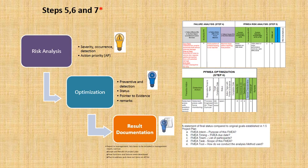And you need to prepare a report to management, and you need to reflect back on the scope and results of the project plan. You need to talk about how the functions in the fields were developed, and you need to plan to address and close out any items that may be still left on the action priority list. One of the other things that you want to do is collate all the high risk levels. You really want to make the report impactful so that everyone knows, especially at the upper management level, those areas of risk that you have addressed.